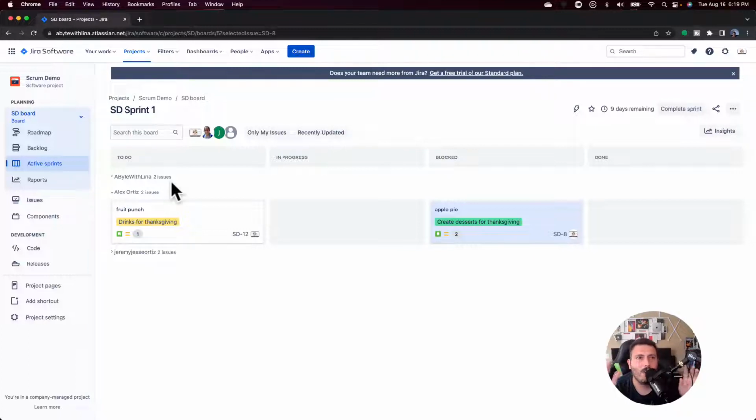And so again, let me recap tip number 2 and tip number 3, which is you want to be listening for things that are out of scope, right? Because if you don't have this visual to help you capture when somebody's working on something that is not in scope, that's a huge red flag. And so Jira is going to help you capture those red flags and nip them in the bud before they become like a wildfire, right? Because way too often teams realize, oh yeah, somebody started working on this, they shouldn't have been working on it. It's like 2 sprints away, 6 sprints away, and all of a sudden it's in scope, or somebody's working on it, making progress on it, but it wasn't what was in scope, right?